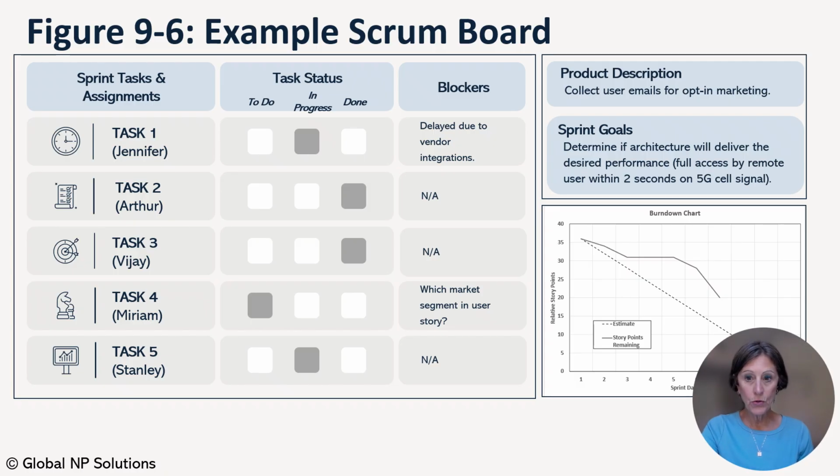Daily stand-up and Scrum board. Previously, the daily stand-up was described as a short meeting at the start of each workday. The Scrum Master notes progress on project tasks and what actions are needed to remove impediments or obstacles for the team. During the 15-minute stand-up meeting, team members address what work they completed the prior day and what they plan to work on during the upcoming day. The key focal point and artifact for the group is the Scrum board.